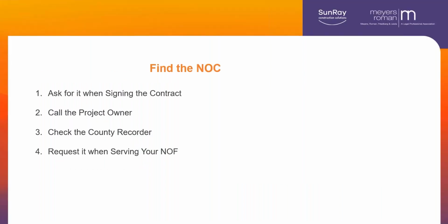Now, to do it right, you have to find the notice of commencement. So the best way to find the notice of commencement is, when you're signing the contract, talk to whoever you're working for and say, hey, you got a notice of commencement? Let me have it.